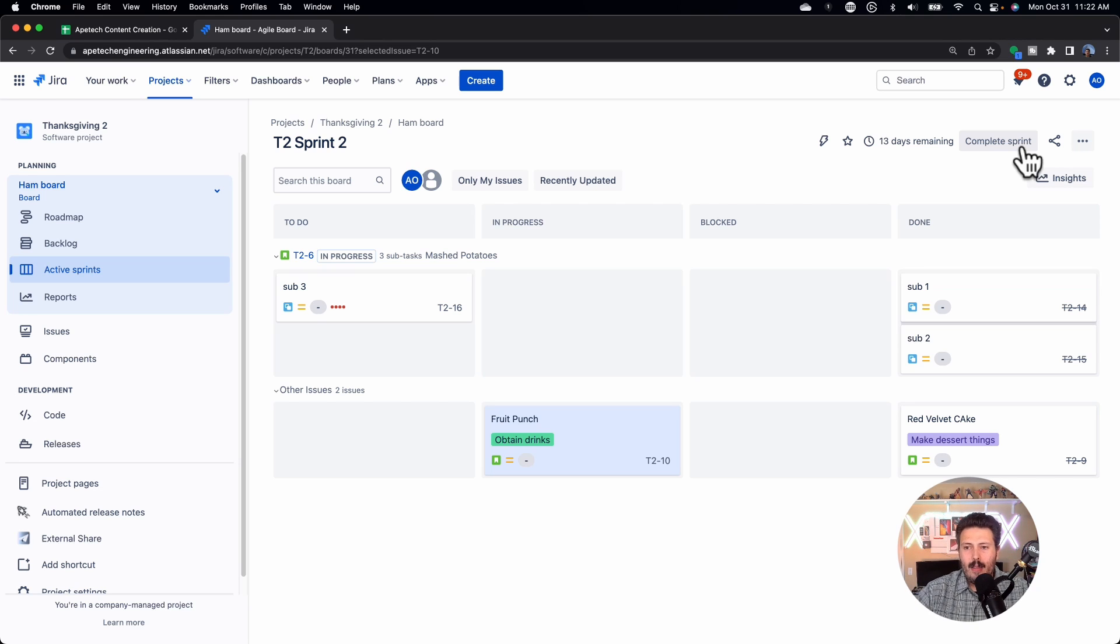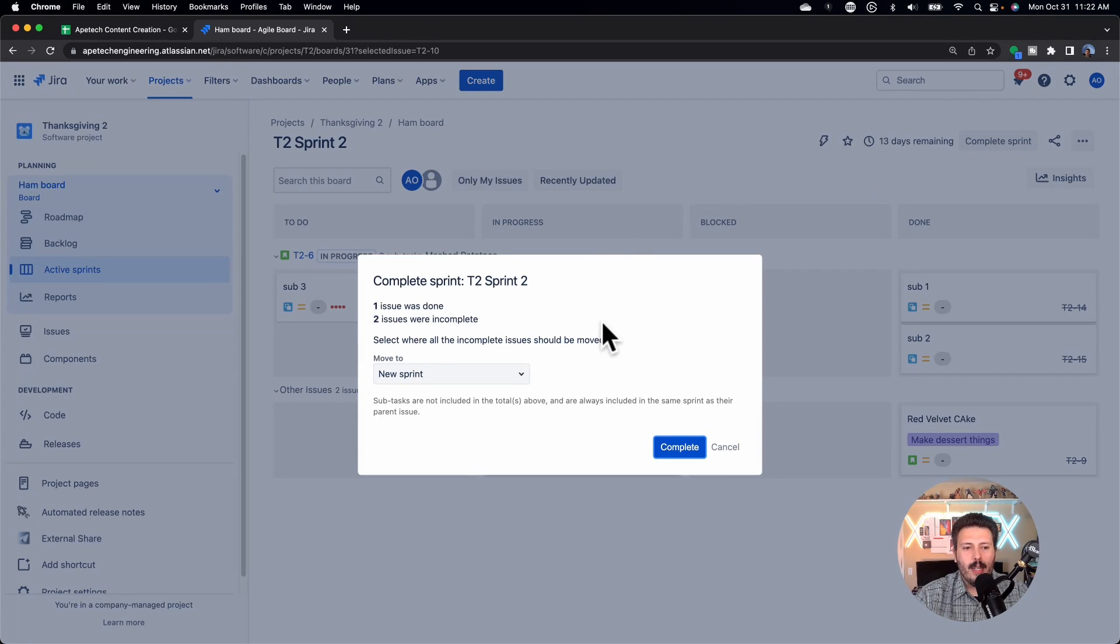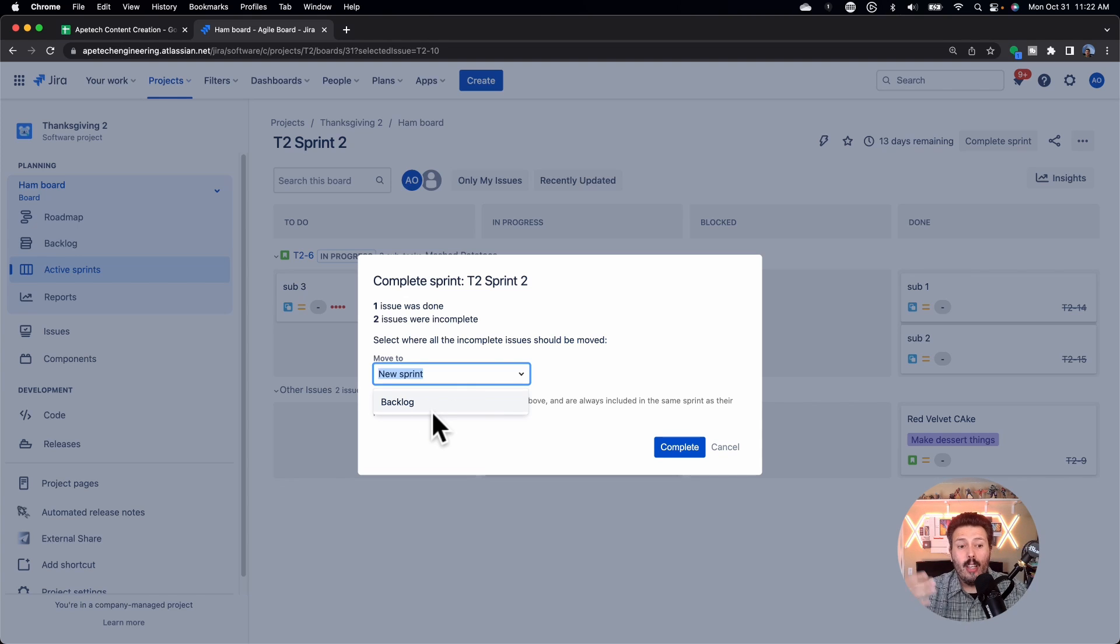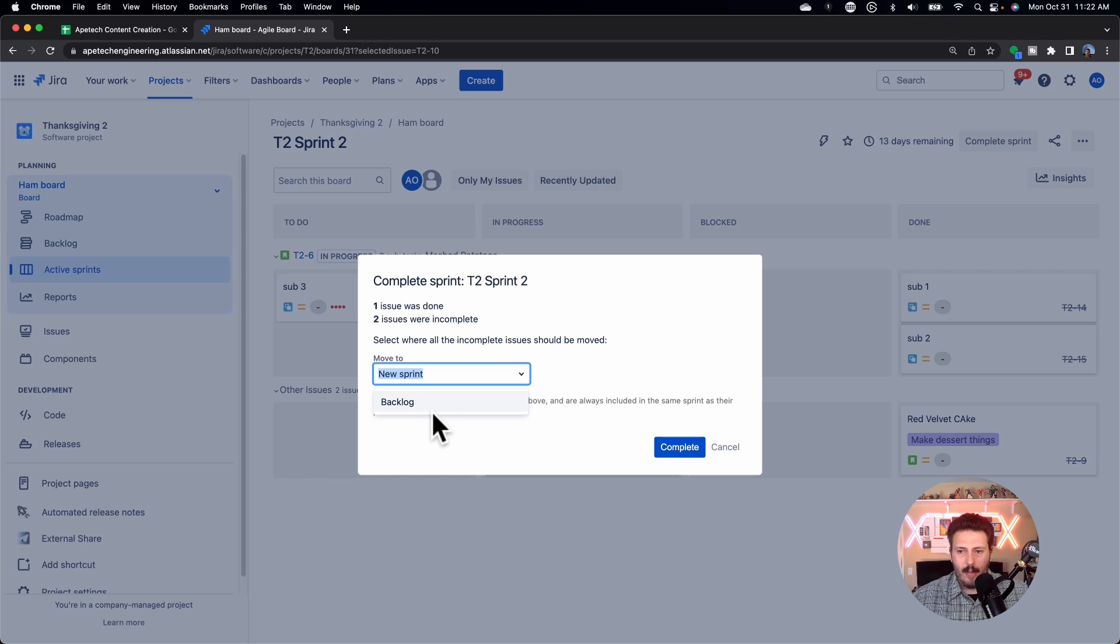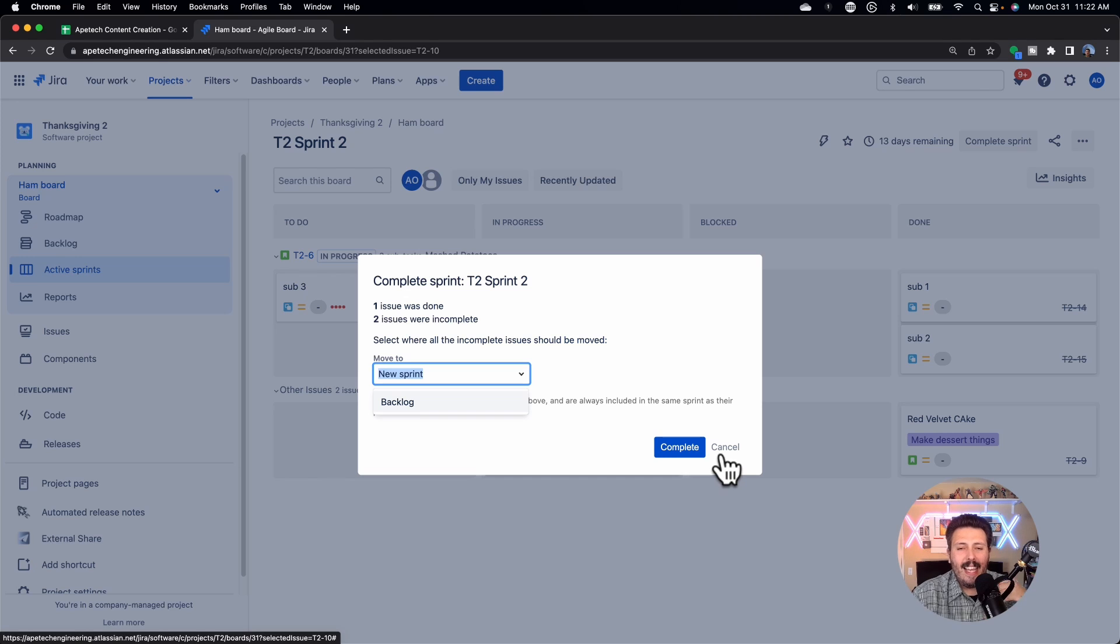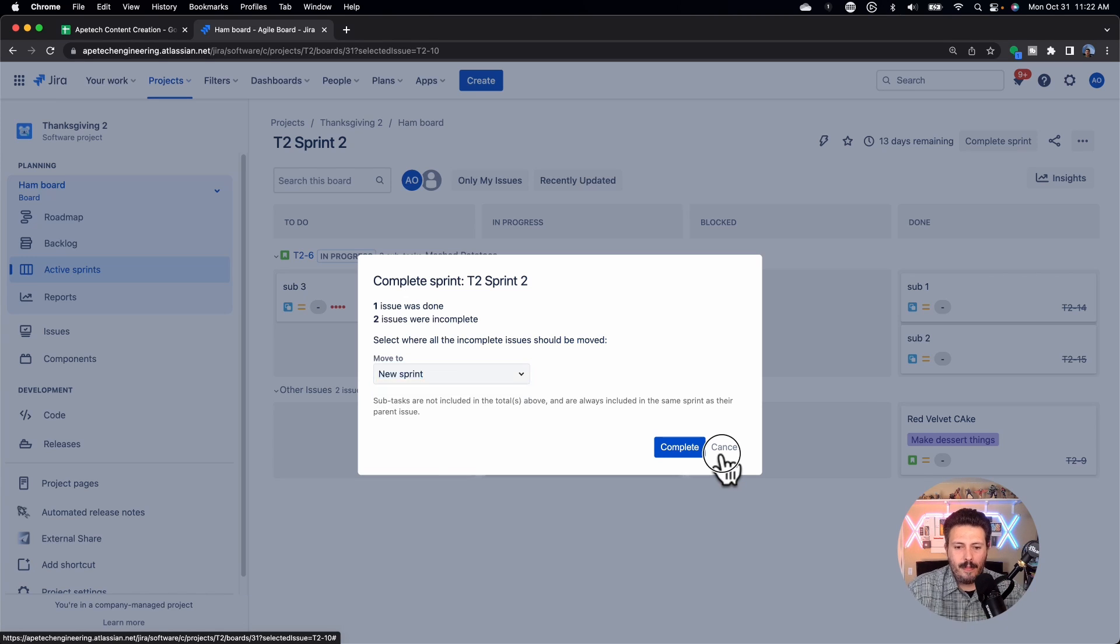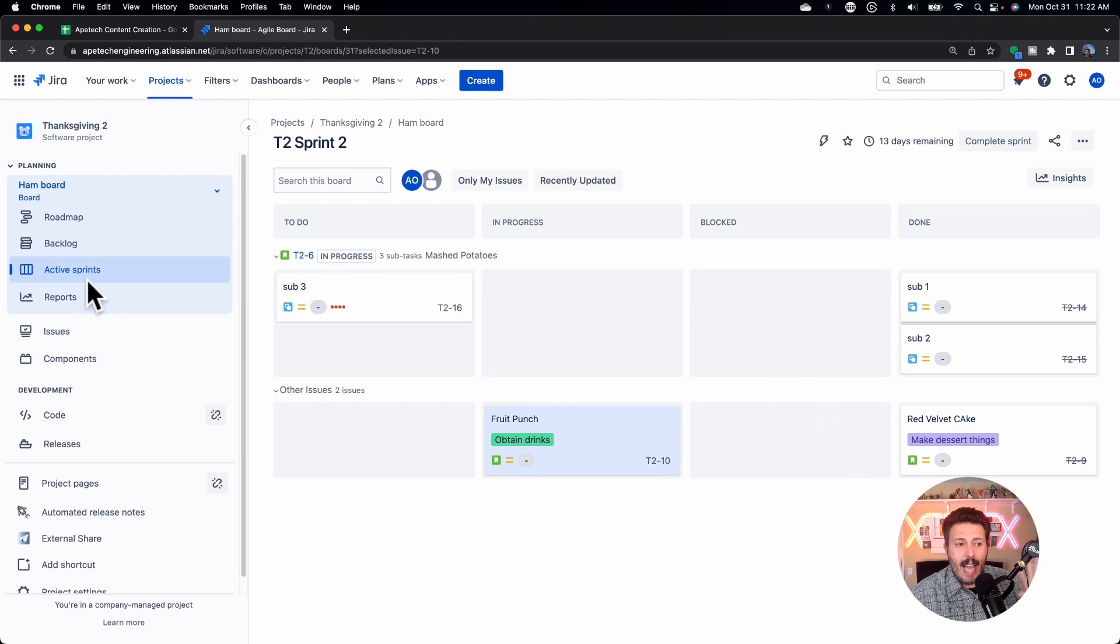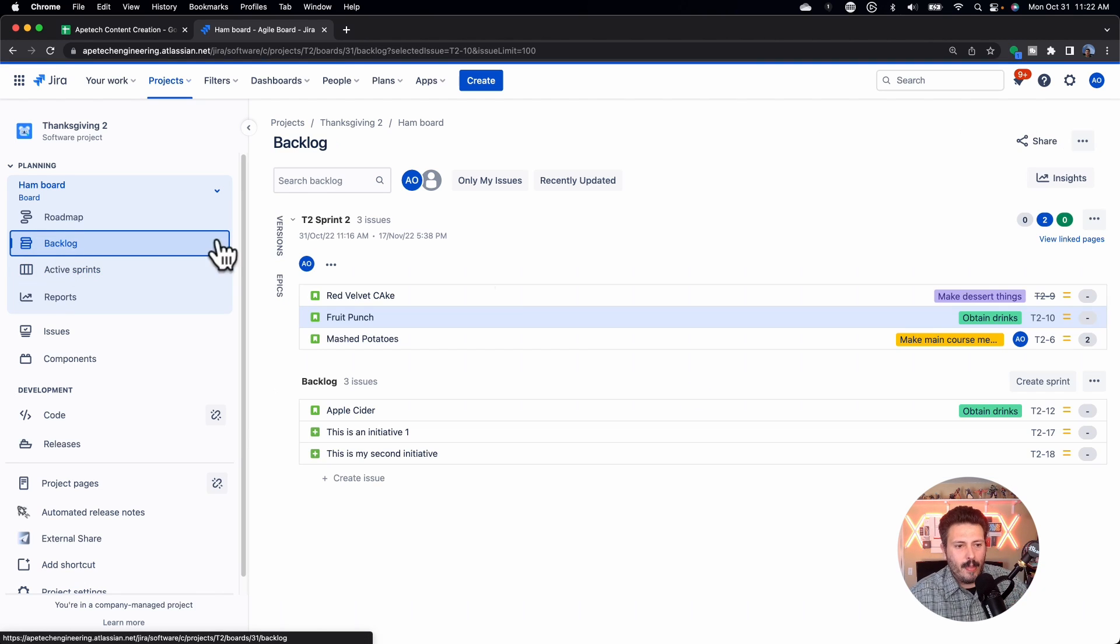And so you basically have a few options. You can essentially just roll the story over. And this is perfectly fine. A lot of teams just roll the whole thing over. Other teams, and because Jira is going to give you this window here, where you have the option to move it to a new sprint, which is the rolling, or you can move into the top of the backlog so that your product owner and your scrum master can essentially reconvene and figure out how they want to proceed. So those are the two options.